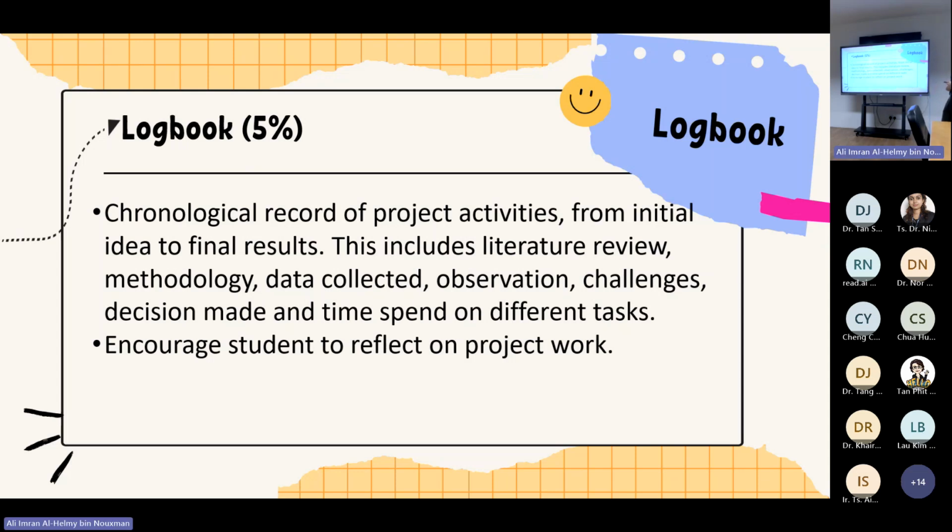Also, it is a place for students to reflect on project work. If you don't pen it down, you actually lose touch of how many hours you spend on a particular work. If you pen it down, then you will know, for example, task A, I'm supposed to spend 2 weeks on it according to the Gantt chart that you tabulated earlier. But in the logbook, you realize you're actually spending more than 2 weeks. So all these things will affect your timeline. From the logbook, you can see that you're running out of time.